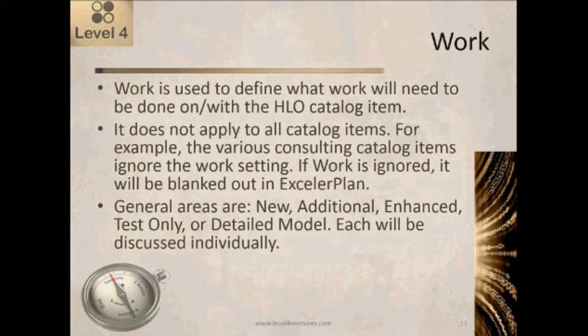If you ever see work turning into a blank whenever you set it in ExcelerPlan, what that's telling you is that for that particular catalog item, work is ignored, and whatever you set it to won't make any difference on the calculations. The general areas of work are new, additional, enhanced, test only, or detailed model, and I'll talk about each individually.